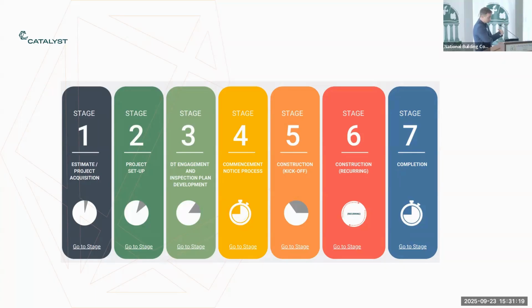If they go on to the BCMS, if there is an issue down the line and this project gets audited for whatever reason, whether it's a Section 11 or there is a failure, and they're going back and looking at this information, any errors in here could cause you issues in relation to incorrect planning references, whether in terms of modular buildings, if you haven't specified that certain aspects of this building are modular, and in reality it was built with modular construction. So it's very important that the accuracy of that information is correct.